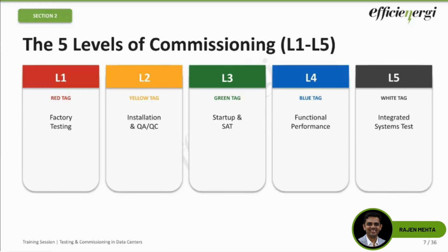And the key principle here to remember is that you cannot proceed to the next level until the current level is complete and signed off. If in reality we did this, perhaps our lives would have far fewer problems, is what I would say. I think a lot of my colleagues in BOM, Argon, these projects will agree. Unfortunately, the reality doesn't mirror what we expect in the ideal world. So it is ideally non-negotiable because each level builds on the previous one.